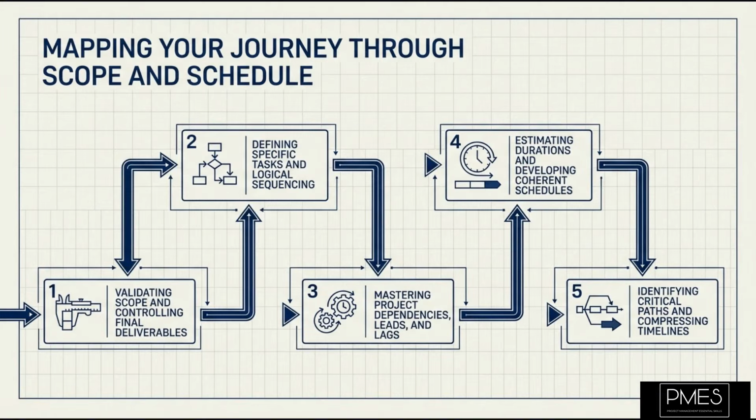Let us look at a simple example of how a requirements traceability matrix works. Imagine our new internal reporting system project. Your RTM would have columns for requirement identifier, a unique number like REQ001, requirement description, such as the system shall display sales data for the last 12 months, source, which might be sales department head interview, design document linking to design spec v1.2, test case linking to test plan TC005, and status showing if it is approved, in progress, or completed.